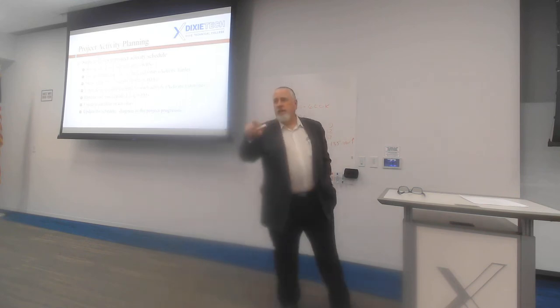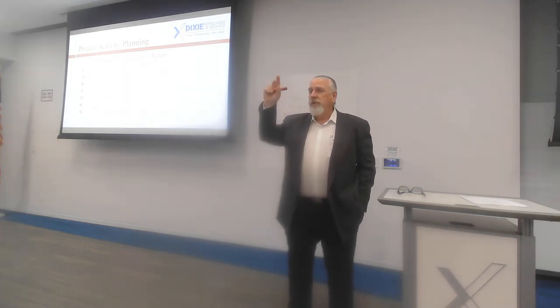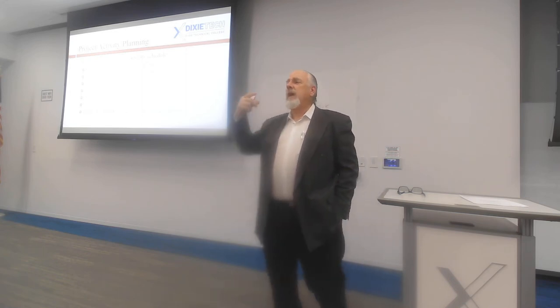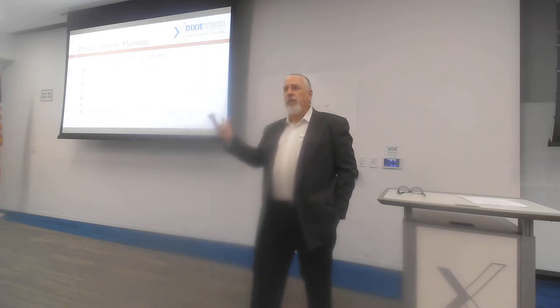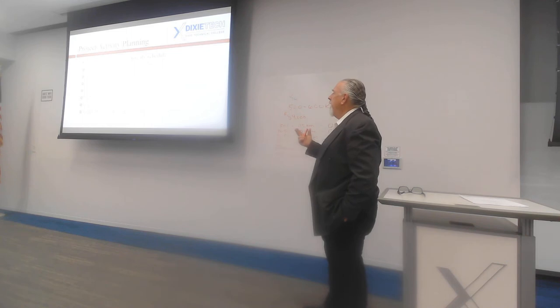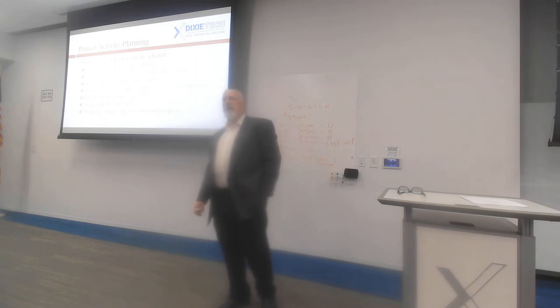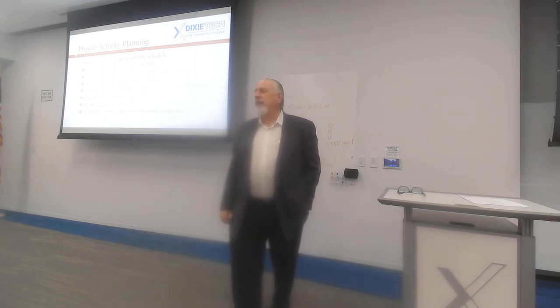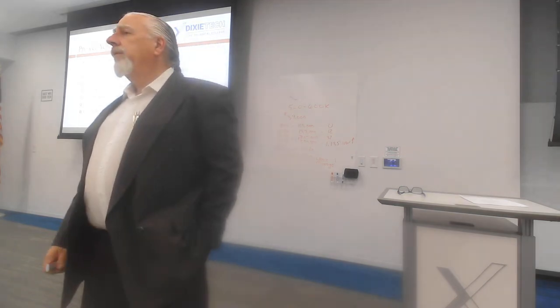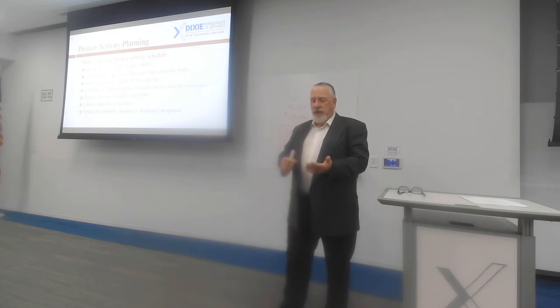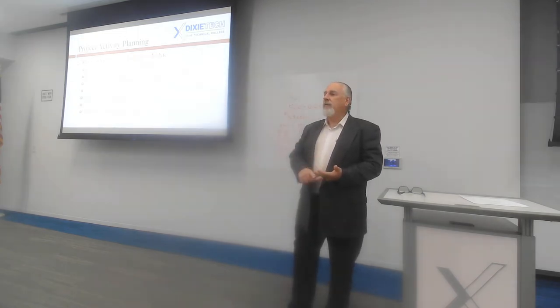These are the activities that need to happen. These are the durations that we're estimating for these activities, and we put all the durations in the same units of time, minutes, hours, weeks, years, whatever it is. And then we are going to describe the dependency or the precedence for each activity. So if we could start all activities on day one, then we'd start all activities on day one. But very few projects can you start all activities on day one. You don't have the resources to do that, and most activities rely on something else to be finished before you can do that one.